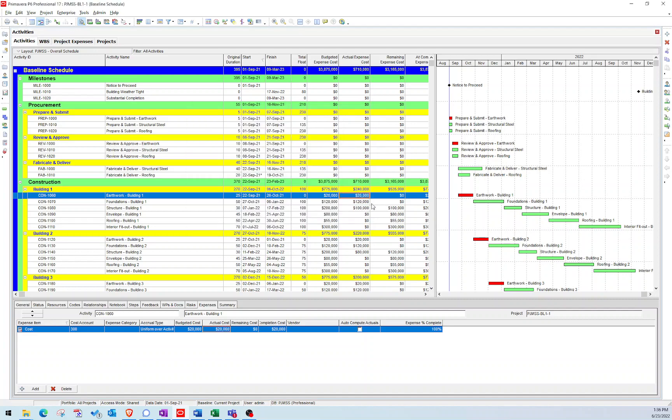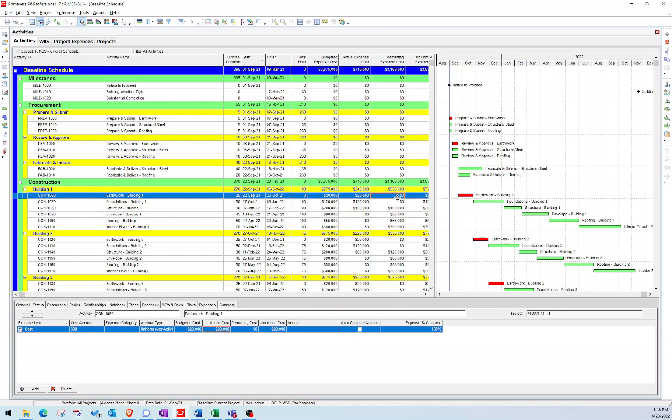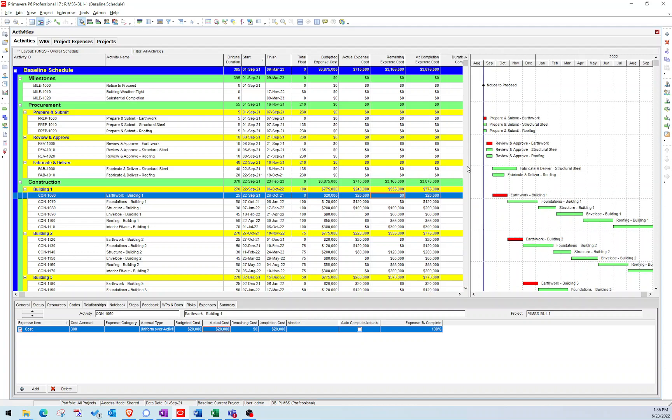And so you can see here, it pulled in all of those actual expense values. It reduced the remaining cost based on how much we billed. And so there you go. That's how you import actual costs into your schedule.